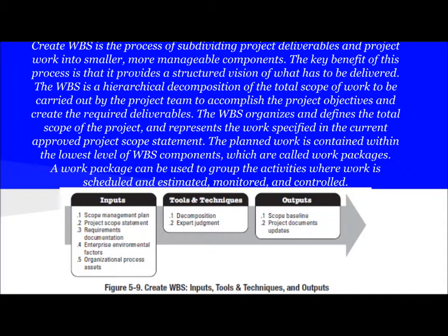scope statement. The planned work is contained within the lowest level of WBS components, which are called work packages. A work package can be used to group the activities where work is scheduled, estimated, monitored, and controlled.